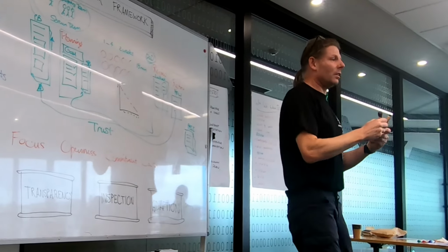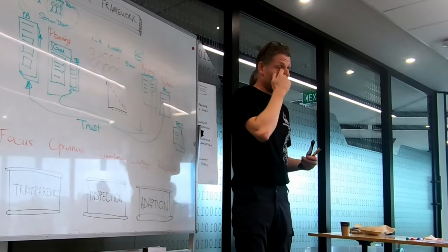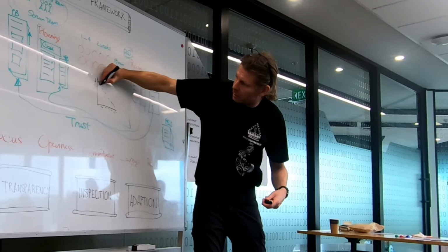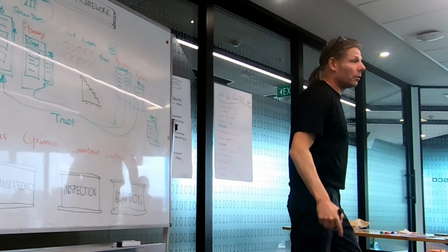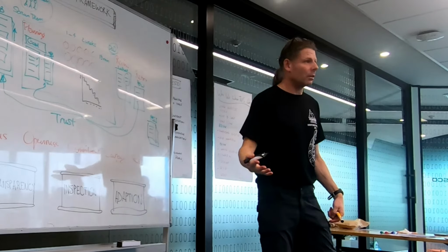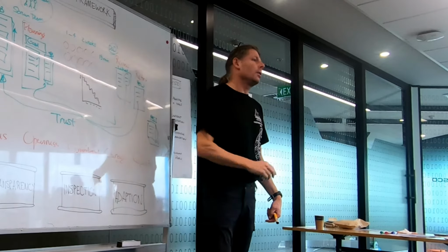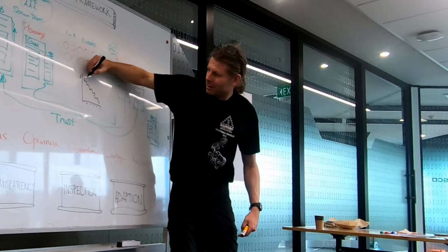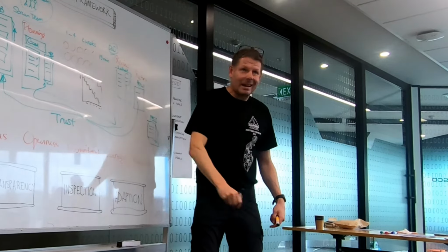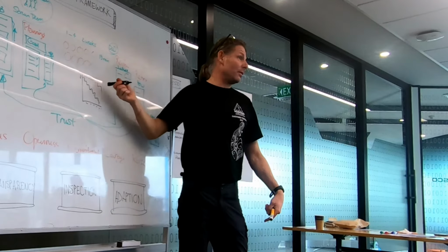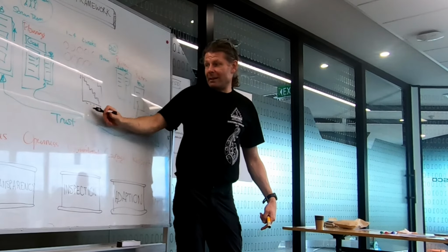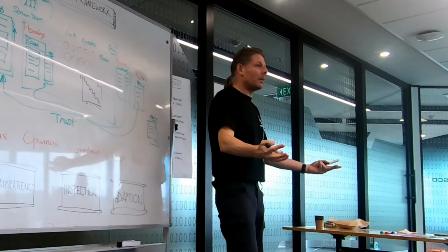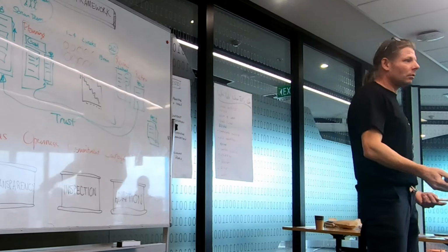But you know how stories go. In an ideal world, if we slice properly, the stories will look like that, yeah? So you know on day 5, you'll be able to go to the product owner, looking good, we're going to meet the sprint goal, looks like we're meeting all the stories. But in the real world, it usually looks like that, doesn't it? That's not good, we want to fix that. And that's the problem we were talking about right at the beginning. But the problem here is on day 3, we have no transparency. We don't know what's done and what's not done.